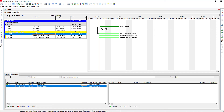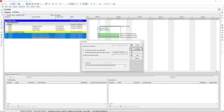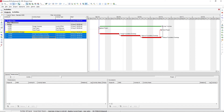Now we need to link these activities together. We click on the first activity, hold down Shift and click on the last one, then right-click and select 'Link Activities'. We can see those relationship lines appear. We press F9 on the keyboard or click the schedule icon at the top to schedule the file. We can now see the start milestone beginning with our first activity, the finish milestone ending with our last activity, and the level of effort summarizing across all the activities contained within it.